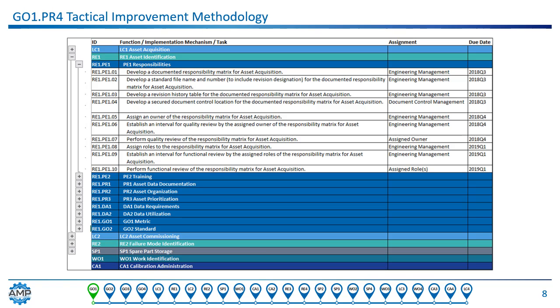The project tasks are usually tracked by the AMC against the overall project progress and health. The AMC considers impact on roles and responsibilities, interaction with other AMP framework functions and processes, and potential risk to business if change is implemented. Improvement plans must be formally assigned to an owner, and a timeline must be established for completion. Improvement plans must contain actions necessary for implementation, timeline for completion, and responsibilities for executing actions.